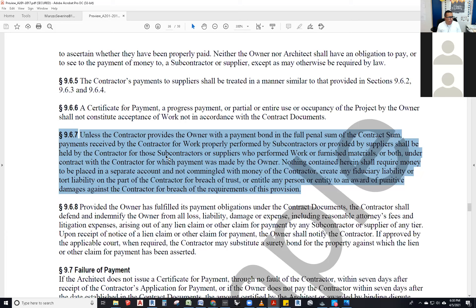Going back, section 9.6.7 says: unless the contractor provides the owner with a payment bond in the full penal sum of the contract sum, payments received by the contractor for work properly performed by subcontractors or provided by suppliers shall be held by the contractor for those subcontractors or suppliers. Nothing contained herein shall require money to be placed in a separate account, create any fiduciary liability or tort liability on the part of the contractor for breach of trust, or entitle any person to an award of punitive damages against the contractor.